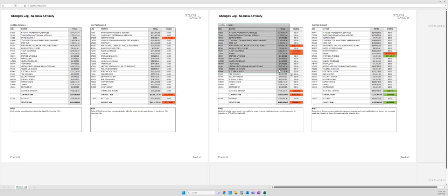Cost plan revision C was issued for 3536, which is roughly another $80,000 increase, and that is the updated cost plan based on extra room added to scope, including partitioning, joinery and flooring works, as instructed by CFO at PCG meeting number 3.